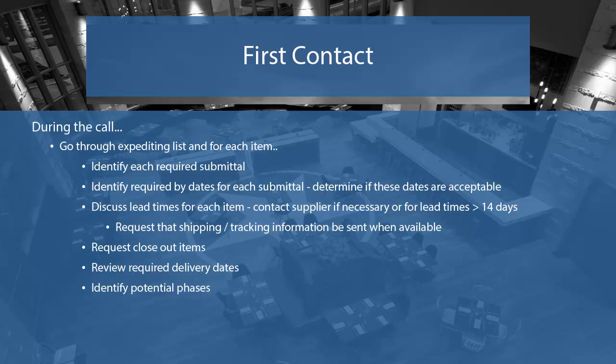With regard to dates and schedules, be sure never to reveal specific schedule information to the subcontractor, and under no circumstances are you to distribute a project schedule. The only schedule you are permitted to discuss is one that has already been included in the sub's contract. You may let them know that project managers will update schedules and contracts when required.